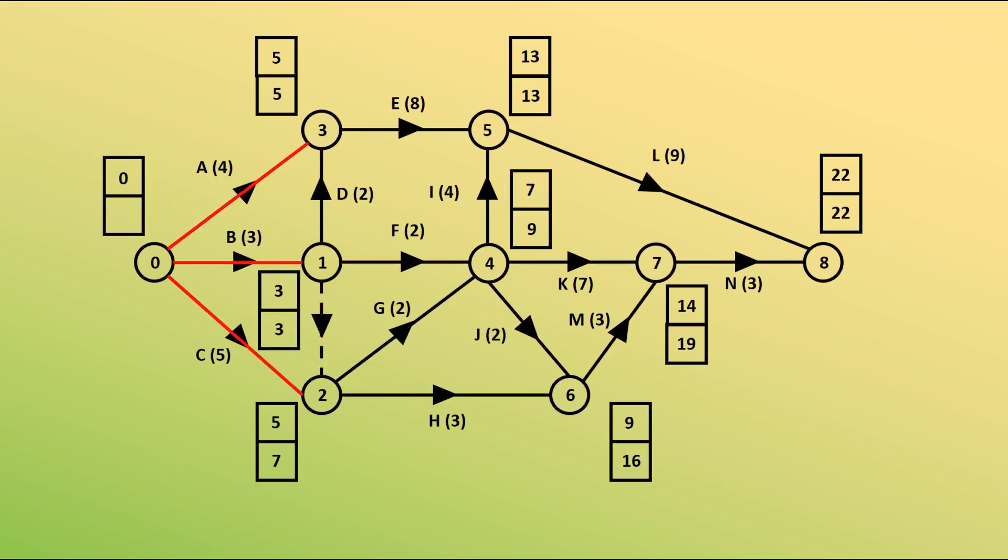Node 0 has 3 coming out of it. Going down a, b, c, we've got 5 take away 4 is 1. 3 take away 3 is 0. And 7 take away 5 is 2. Of course, the lowest of those is 0, which is what we expected. So we've completed our backwards pass, and we've now got the early and late event times for each of those events.